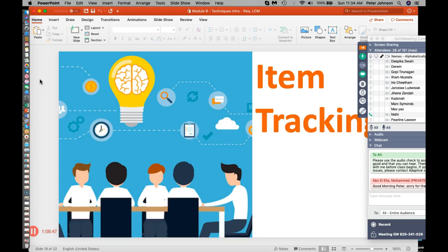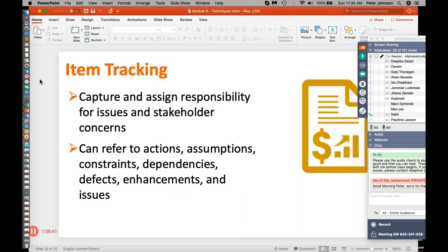So another technique involves item tracking. Now, I think of items not necessarily as requirements that are managed in a product backlog, but of things like issues, things that need to be resolved, work activities, something that we have to have a meeting to resolve, or we have to solve a certain problem. And so we do a lot of that with item tracking, which is sometimes called issues management, very closely related to item tracking. Or if we have things like test plans, we have different test scenarios, and we do item tracking to track the progress of those particular things. Which ones have been tested, which ones passed, which ones went in for some new work, which ones are going to be retested.